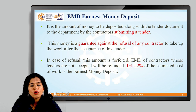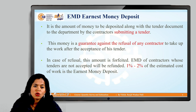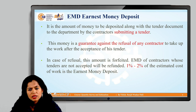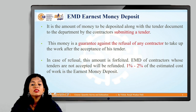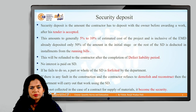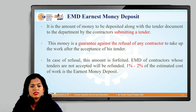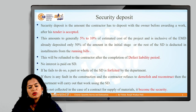EMD is generally one to two percent of the total project cost. If a contractor refuses to do the work after being awarded the tender, the EMD amount is forfeited and not refunded. If bidders are not selected during the process, their EMD is refunded. If a person fails to submit the EMD, their tender is considered invalid.